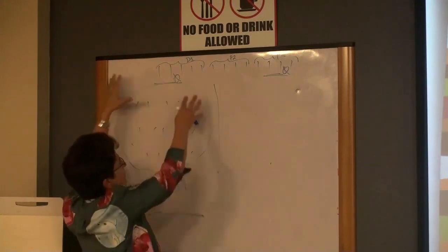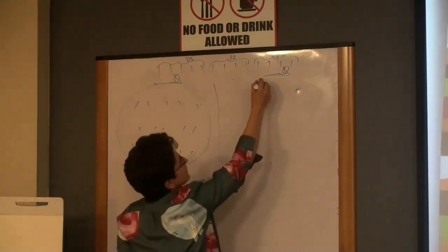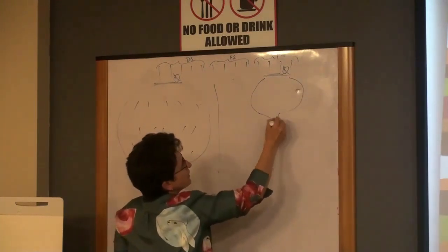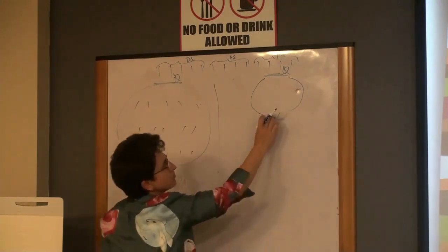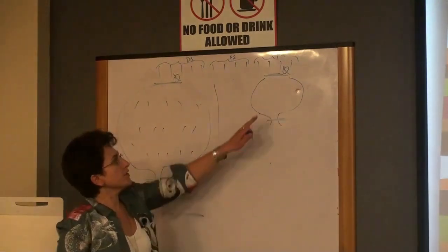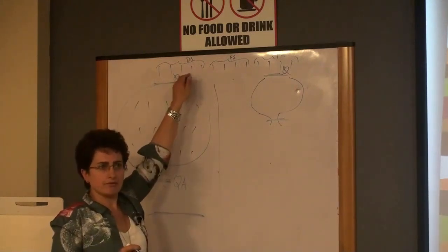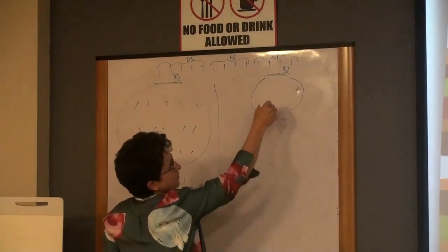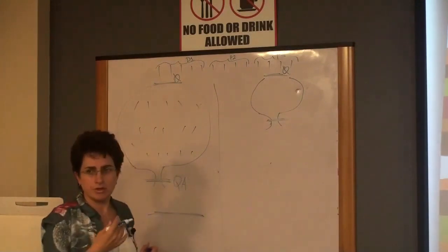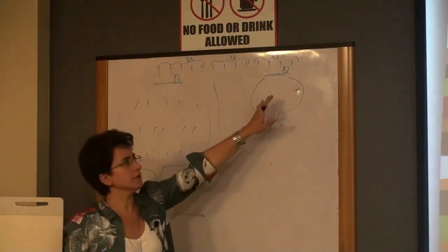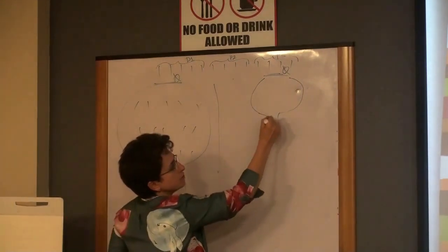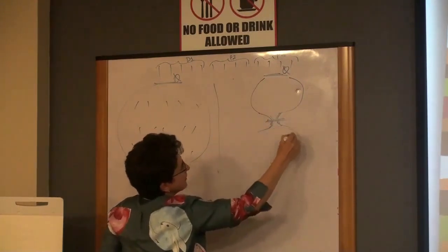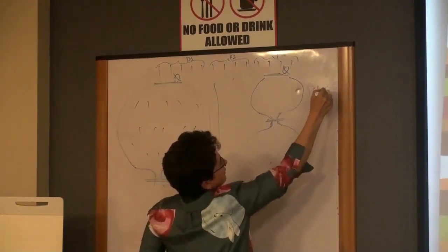So instead of having one big blob of code with unknown quality, the development team develops some code, and at this point, we try to understand the quality and see if the quality of these 5 features is good enough to release. And then we, QA people, test whatever developers developed, and if you find this product to be of sufficient quality, we go and implement the next set of features, which may be, so this is the P1 features, let's say we had 5, right?